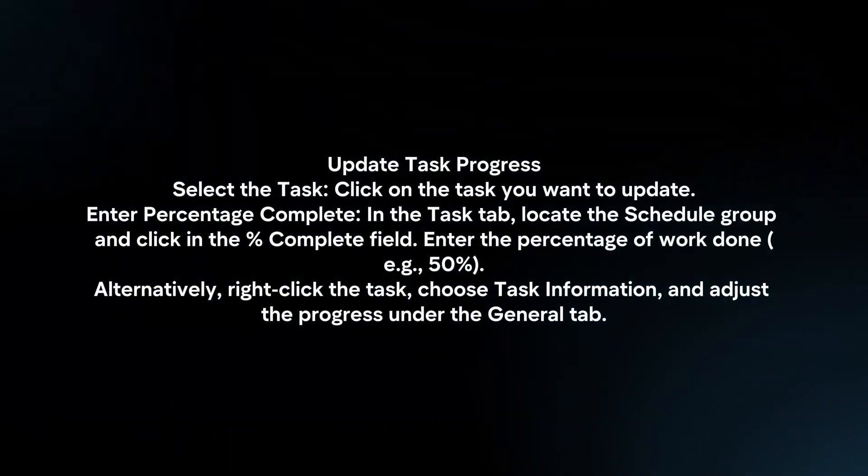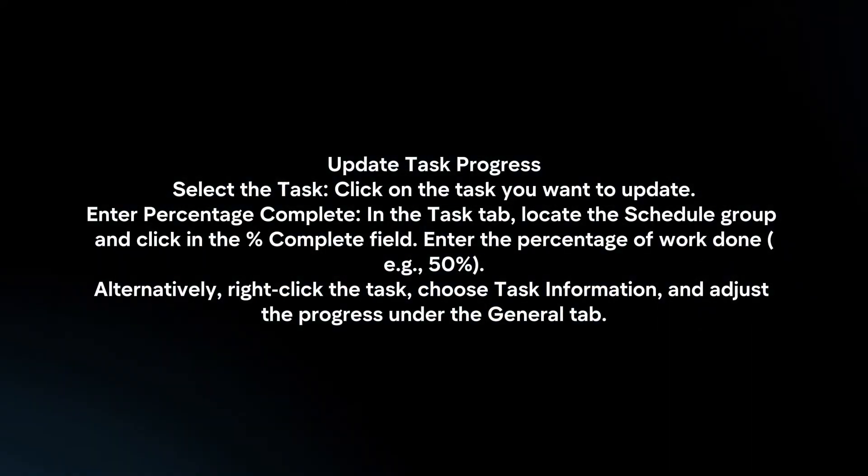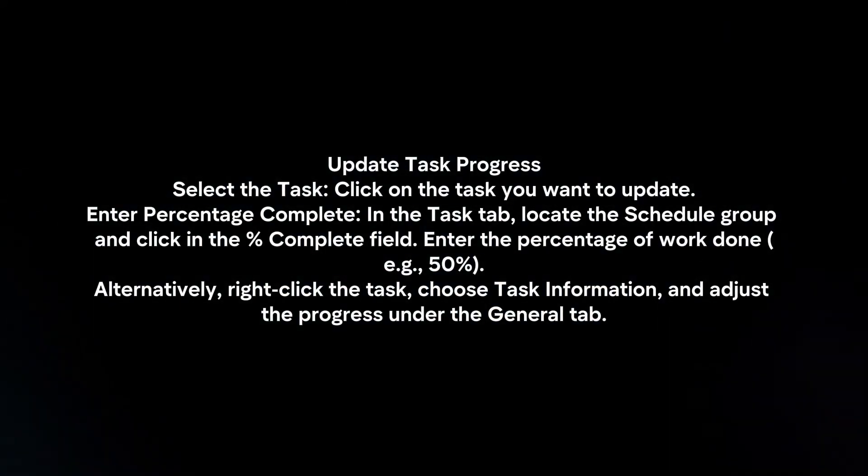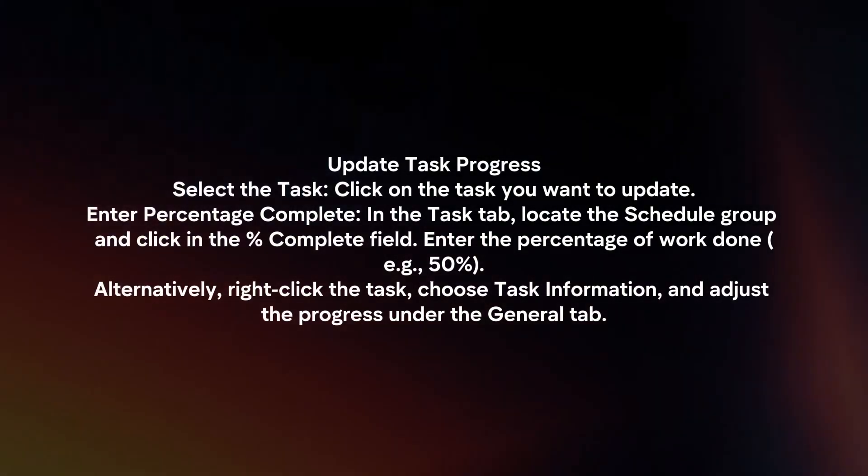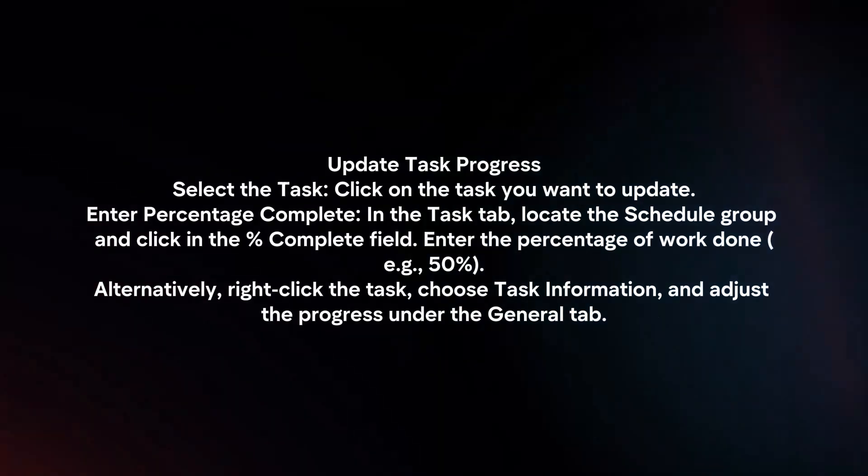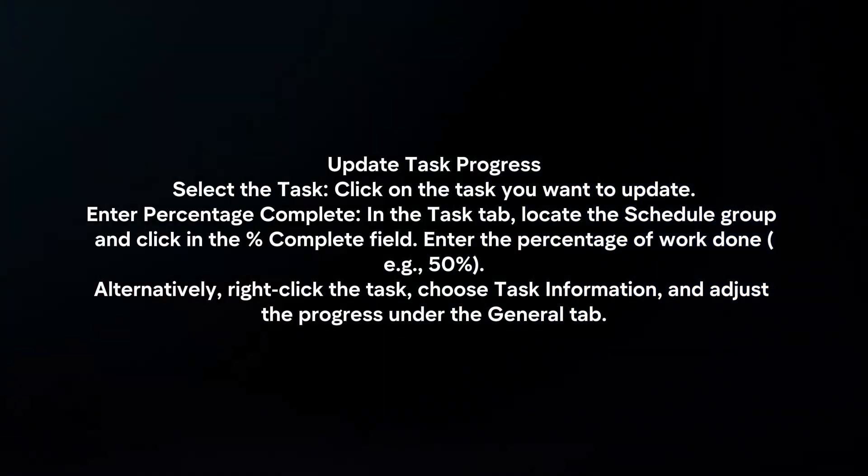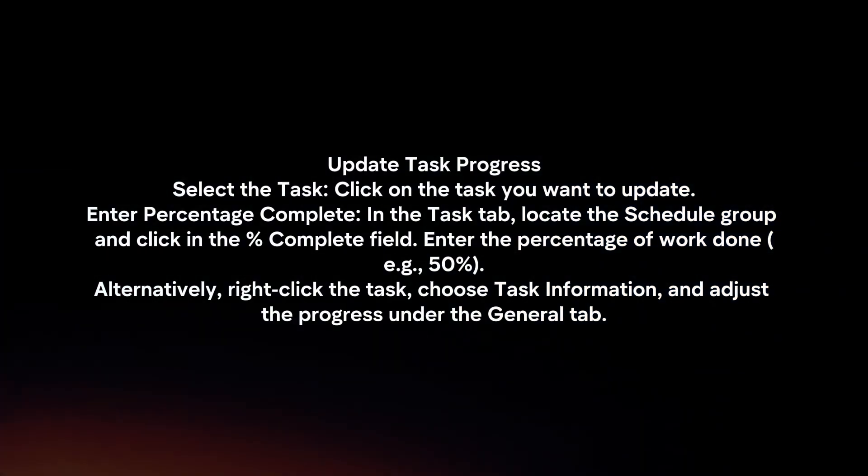Enter percent complete. In the task tab, locate the schedule group and click on the percent complete field. Enter the percentage of work done.